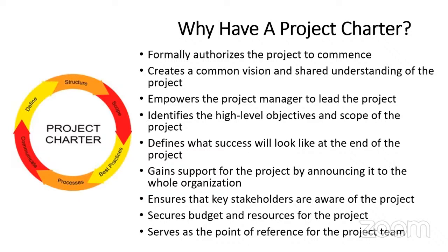However, it is critical and crucial for us professionally to have a project charter. A project charter gives us the summary of the project at a glance: what the project is about, who the project is for, who is performing the project, the duration, the budget, the high-level requirements, the high-level scope of the project, the expected deliverables, the stakeholders, and their roles. Those are the things expected in the charter. And the parties need to endorse their agreement to the arrangements made available in the charter.